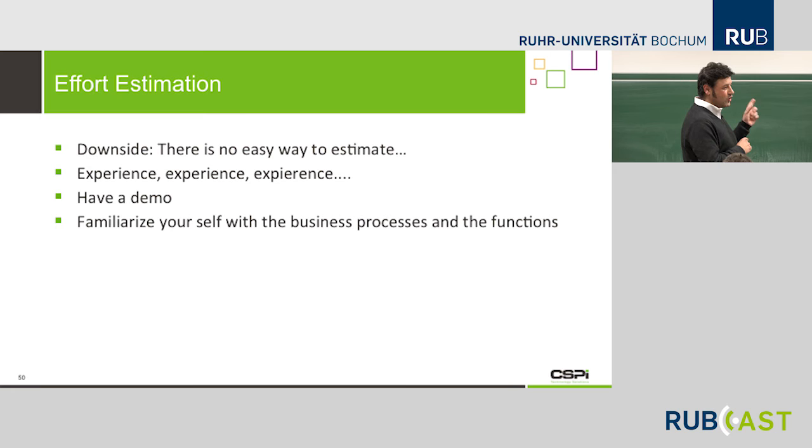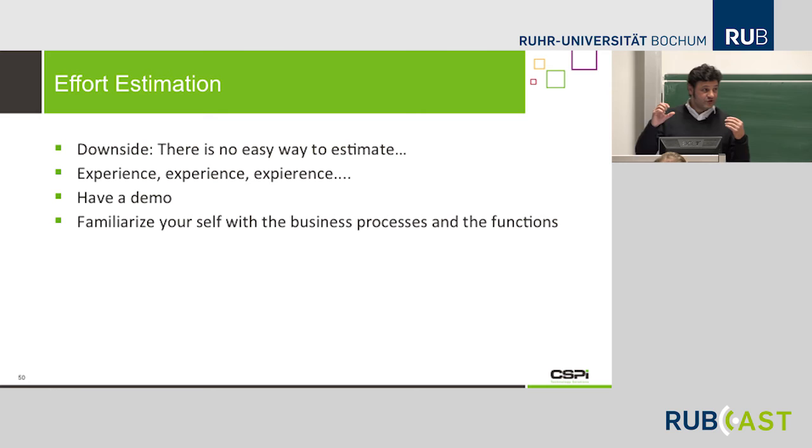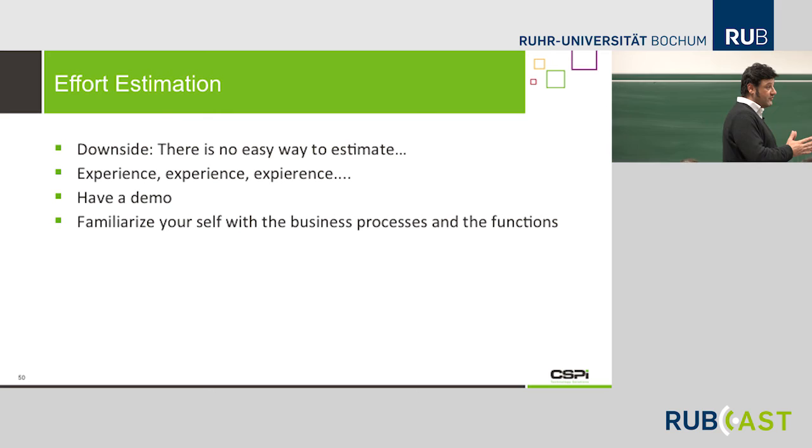And also a good way to estimate the effort is to have a demo. Just play around with the application, understand the application first, and see how many different user roles there are, how the system is managed, and how many different user types there are, so that you get a feeling for the application before doing any testing. Once you have learned the application, it's much easier to estimate the effort. The demo is like going through the use cases at the end. It's a practical use case workflow.